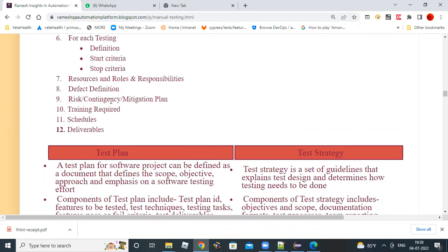Another, third risk is that your application environment is down and not able to be restored. Then the time will be lost, right? How can we handle that? You can prepare one more environment. If one environment is not working, you prepare another, or ask the DevOps team to look into why the apps are going down and what the reason is.